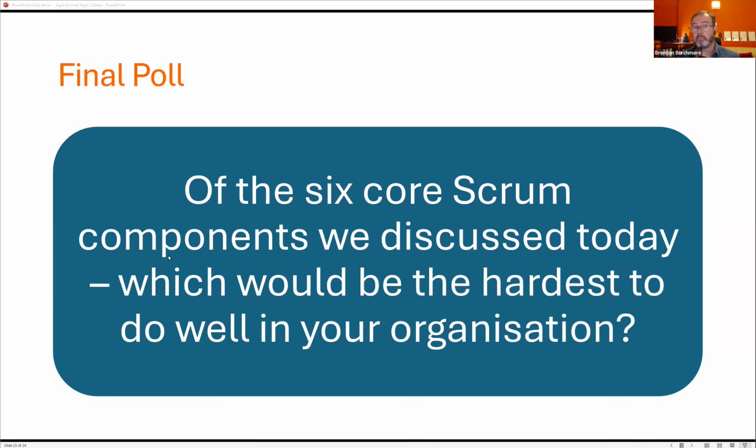For some team members, they could be working on this user story for this project, and then next week work on this one and this one. It could be different projects, and that might be no different to two different user stories that happen to be in the same project that are just equally unrelated. That can happen. But what you need to protect is the cognitive momentum: when someone's working on a user story, let them finish. Let them maintain all the things that they've got in their head and leverage that, and don't ask them to dump that for something else and then pull it back into their head again later, not for the wrong reasons or for juggling.